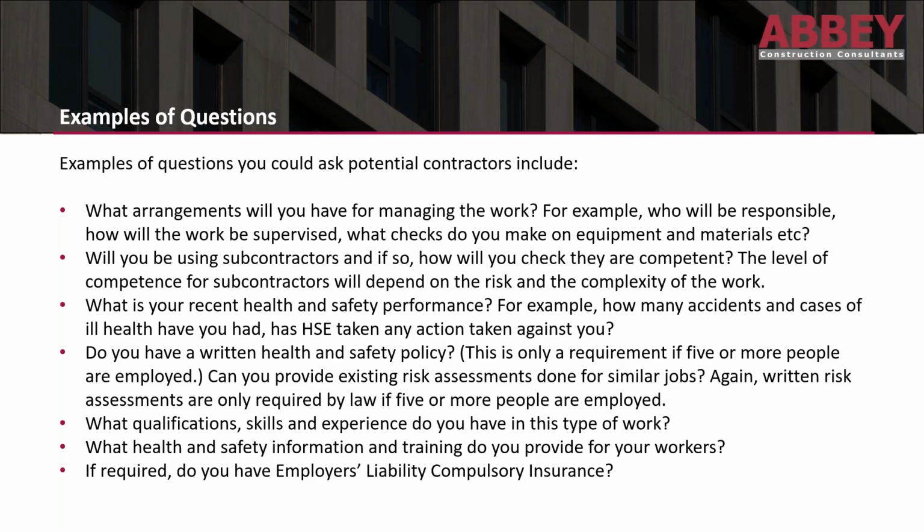But there's also the individuals who will be doing that work on site. So what qualifications, skills, experience, knowledge, behaviour have they got on that site? So, for instance, CSCS cards will be one piece, but not ultimately a competent method of showing their competence.